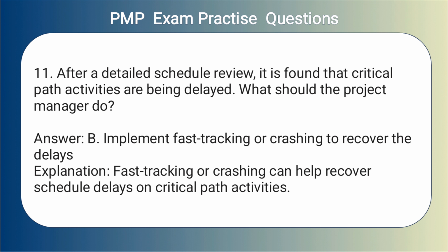Answer: B. Implement fast tracking or crashing to recover the delays. Explanation: Fast tracking or crashing can help recover schedule delays on critical path activities.